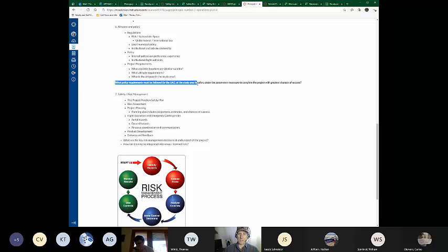Well, to get that sensor to capture data at our target resolution, maybe I have to fly at 600 feet instead of the FAA's mandated 399 feet, right? So to successfully achieve my goals for the project, now I have to go out and seek a waiver from the FAA to adequately conduct the mission. So these are the type of things I'm hoping you guys will uncover.